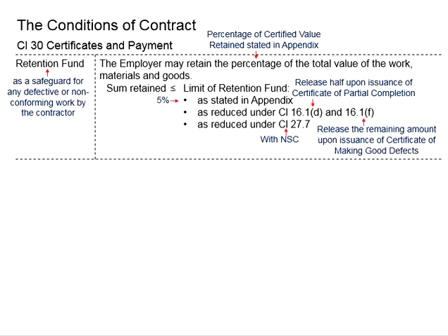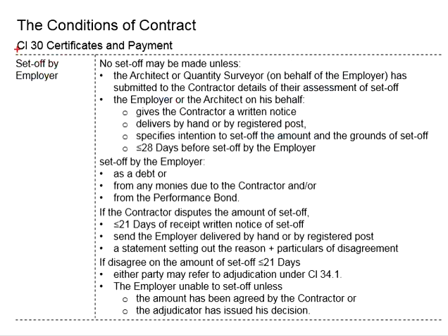This retention fund may be used to finance the rectification job. This serves more like a preventive measure as compared to the set off, which is a responsive measure.